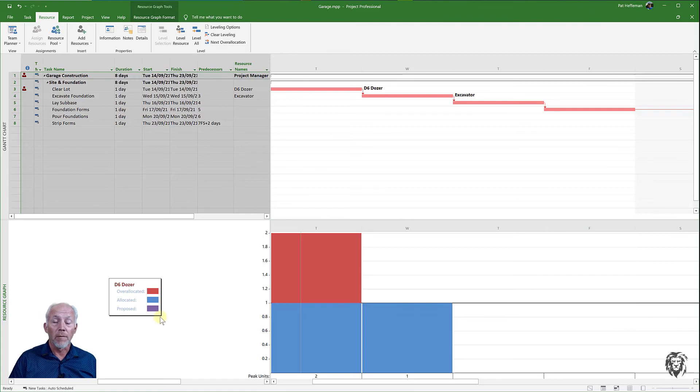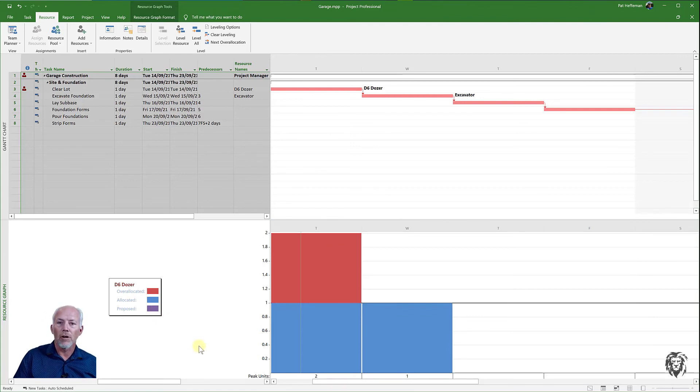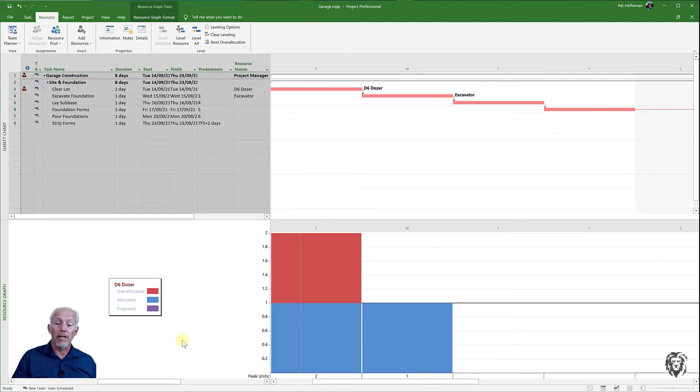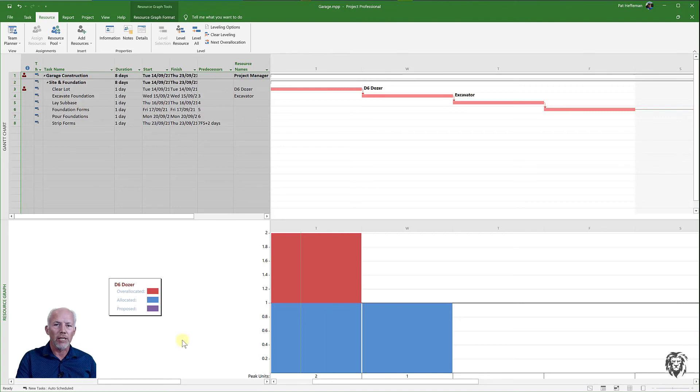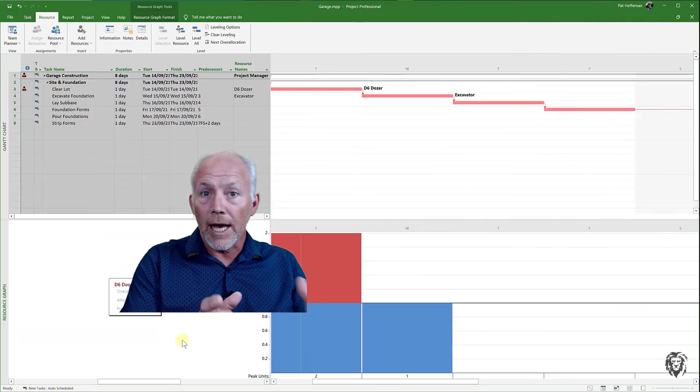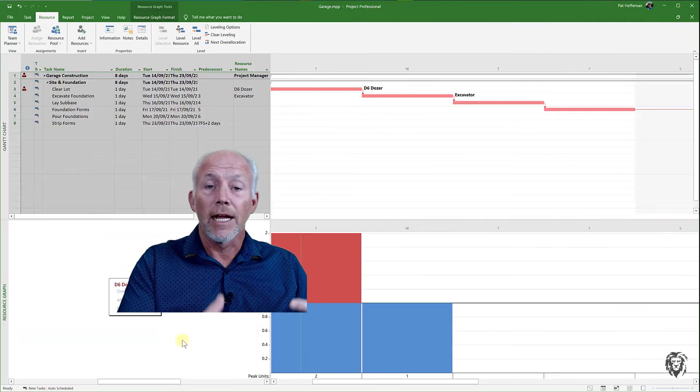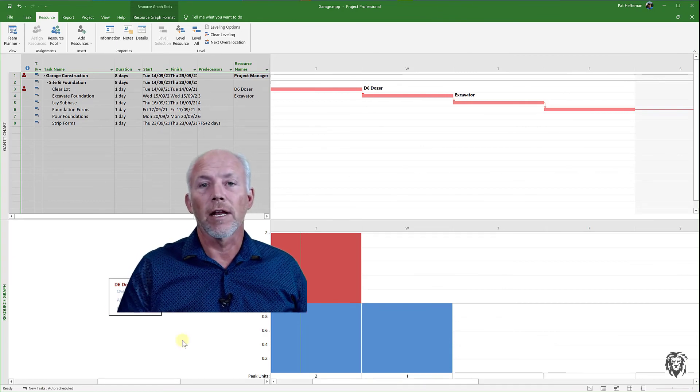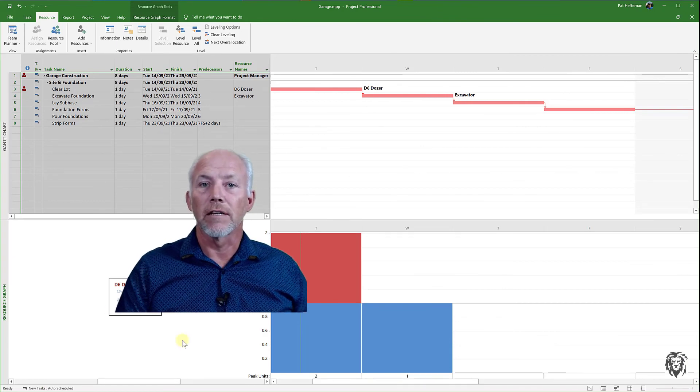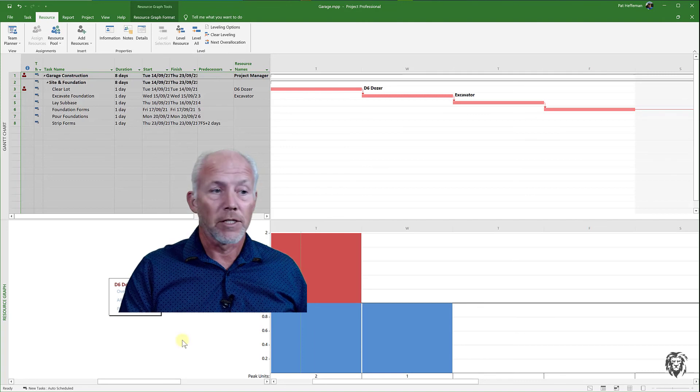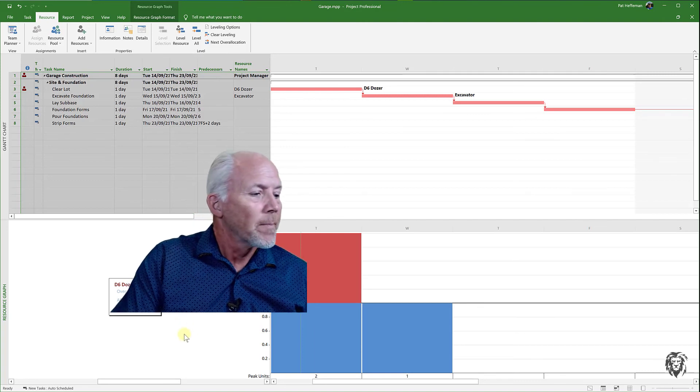It's combining the resources or the resource usage from each of the projects that are drawing on that central resource pool and so this is the real value. Now with all the tools that we've already looked at for project crashing and resource leveling we can go in and start to see those over-allocations resulting from the resource dependencies of multiple projects.